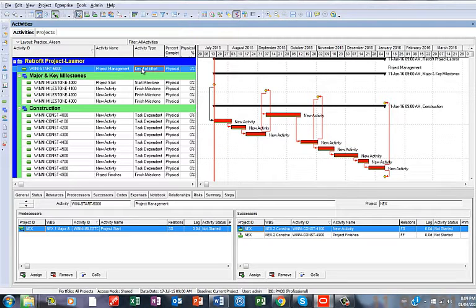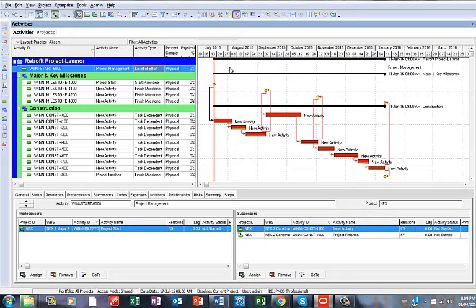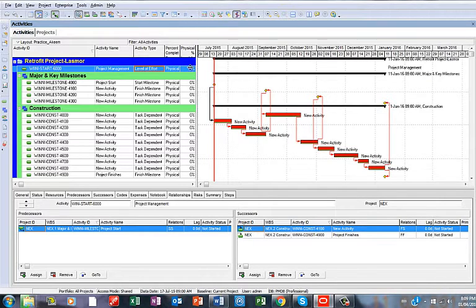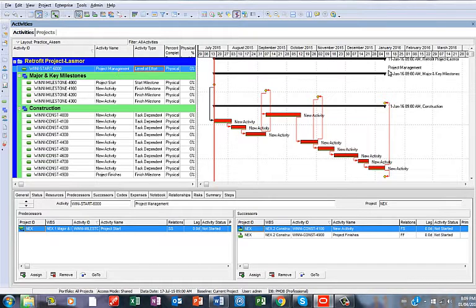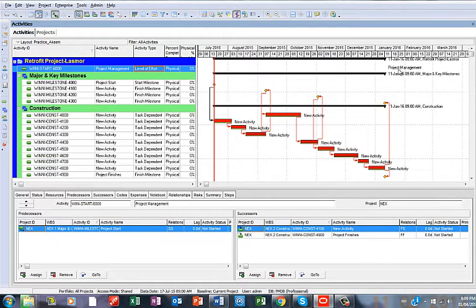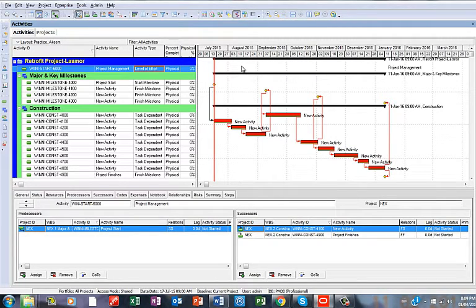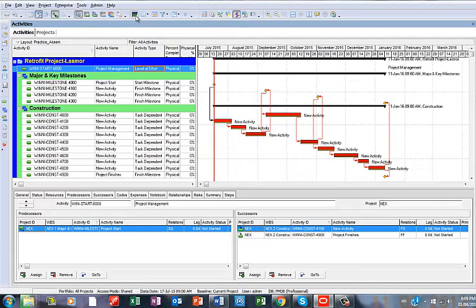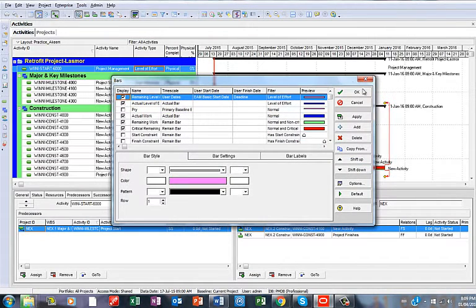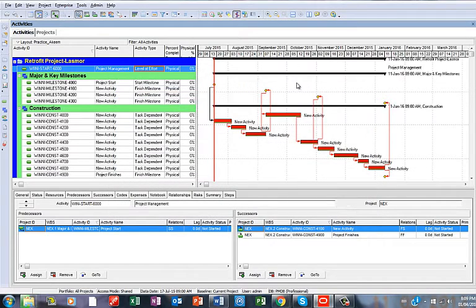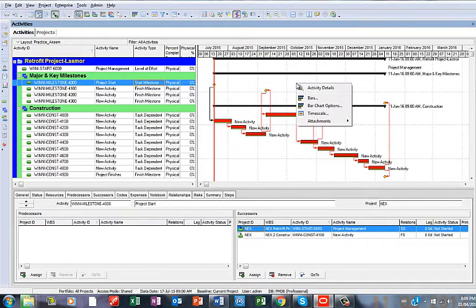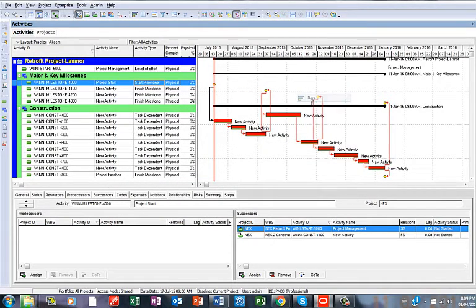As you can really see, this is the activity name which is Project Management and you're going to find Project Management here, but where is the bar gone? You'll be wondering where's the bar. So what you just need to do in that case is you either go on the bar here or you possibly right-click on the screen then you say bar.